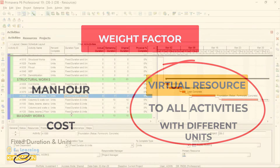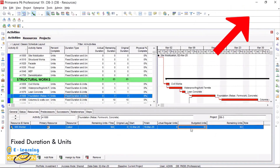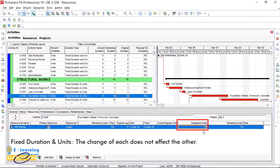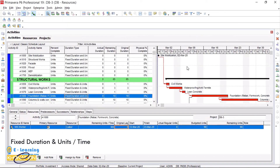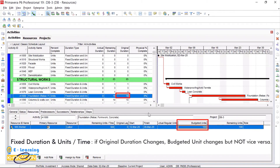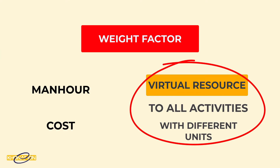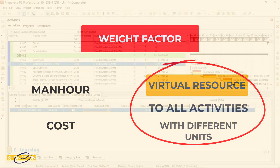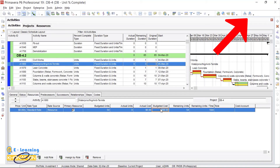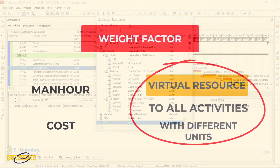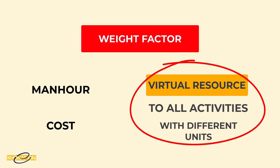We calculate the total man hours needed for finishing one activity and insert it into this virtual resource in the budgeted unit section. Weight factor relies on two items: man hours and cost. We can also insert cost into this virtual resource. It is not necessary, but it is ideal to insert costs into virtual resource, because later we want to get cost performances like CPI — cost performance index — from our project. So it illuminates the next steps.